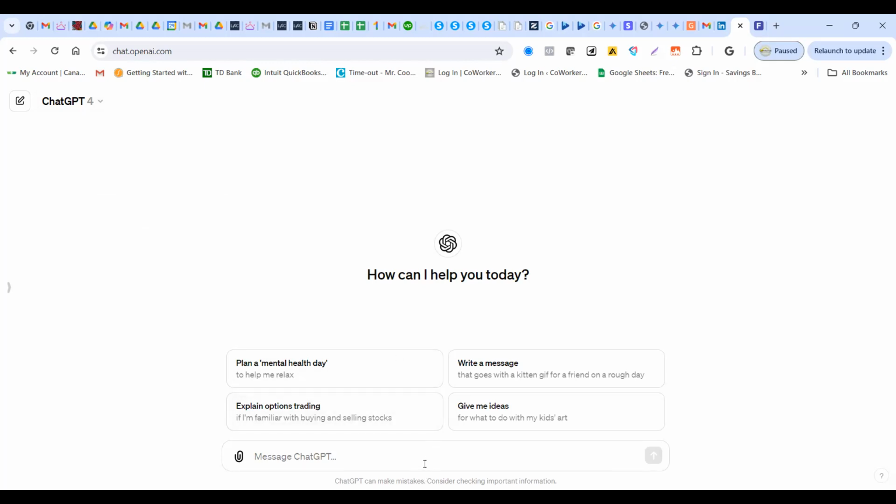Okay, so the instruction I want to give is that I want it to actually create some documents for us once we have the business case. Essentially, a business case document gives the validation. It gives the reason why this project is needed. What are the current problems? What will the outcome of the project help with? And what will be the possible ROI?